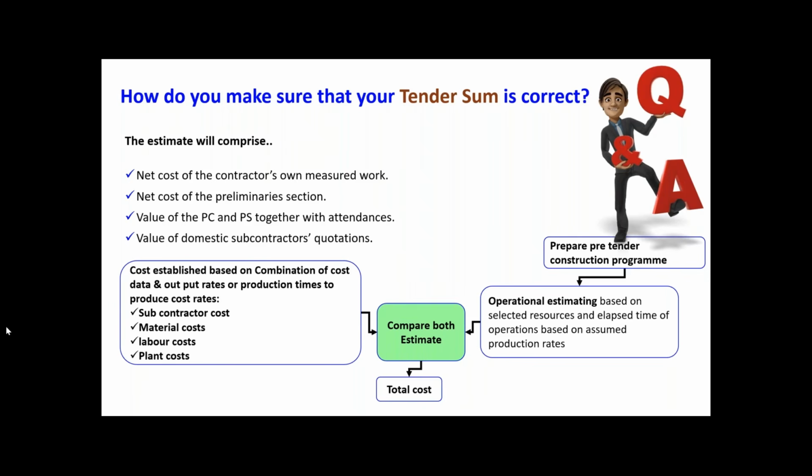Another thing is the time given to prepare the tender document and tender submission is less. So how are we managing? Yes, that is a very big challenge. That is the issue nowadays. We can see so many issues during the post contract. Contractor doesn't have time to read the drawing. How can he price it? So during the post contract, all the ambiguities are identified and bring the troubles. So it is better to advise giving sufficient time for tender preparation and tender evaluation.